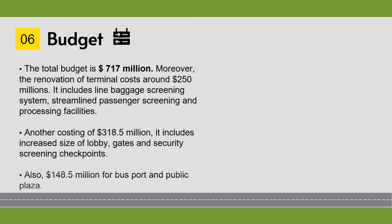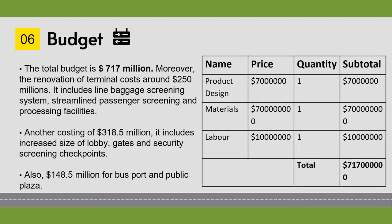The total budget of our project is approximately $171 million. The renovation of the terminal costs around $250 million, which includes baggage line screening systems and streamlined passenger screening and processing facilities. Additionally, $1,318.5 million covers the increased size of lobby, gates, security, and screening checkpoints. Another $148.5 million includes the bus port and public plaza. The connector also makes it easier for passengers to reach their connecting flights.